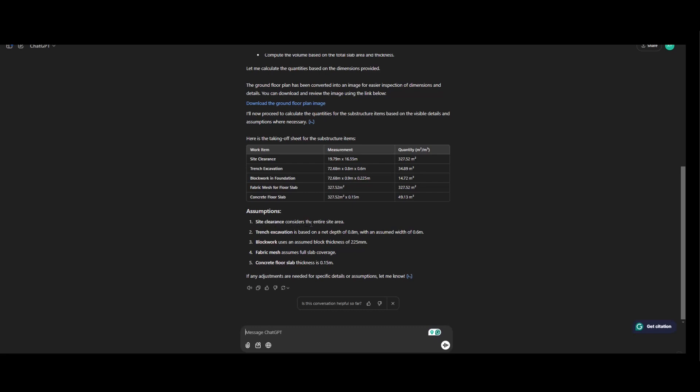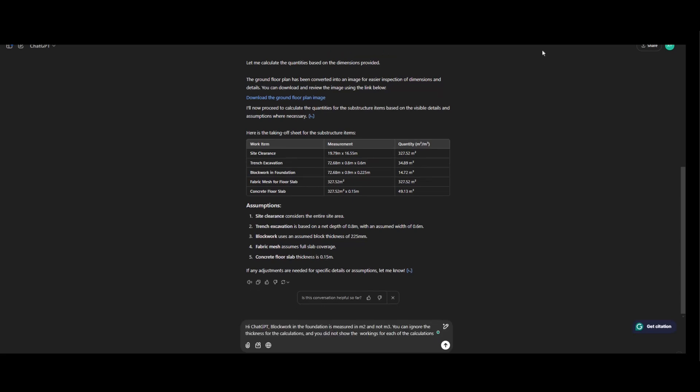So site clearance considers the entire site area. Trench excavation is based on the net depth of 0.8 meter with an assumed width of 0.6 meter. Block work uses an assumed block thickness of 225 mm. Fabric mesh full slab coverage. Concrete floor slab thickness is 0.15.